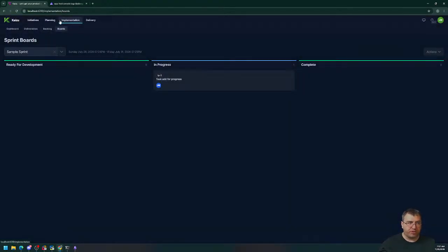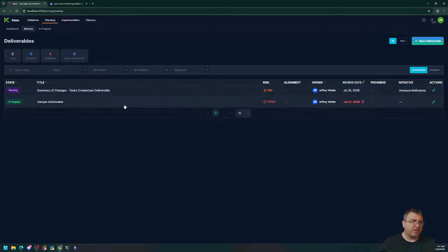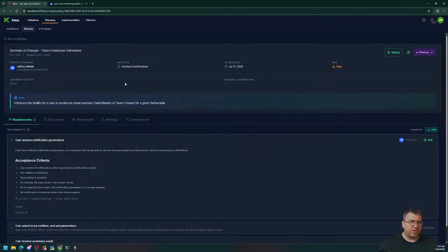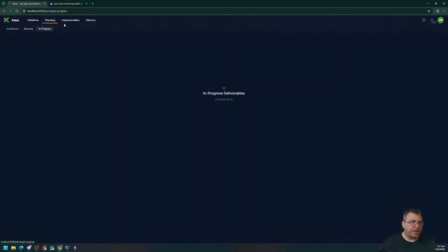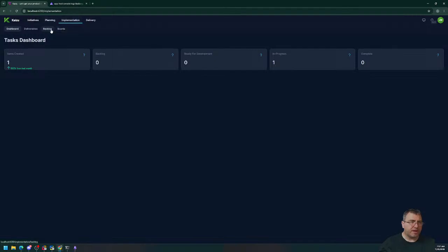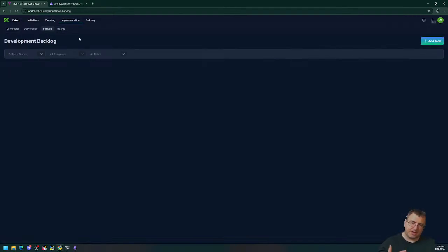Many teams can contribute to an individual deliverable. So a deliverable is not based upon a team. A deliverable is assigned to many projects, which I'm actually rethinking at this point. And then the tasks are created. So if you have DevOps and development and DBA tasks against a single deliverable, they can still remain 3 teams with just their specific tasks focused on them.